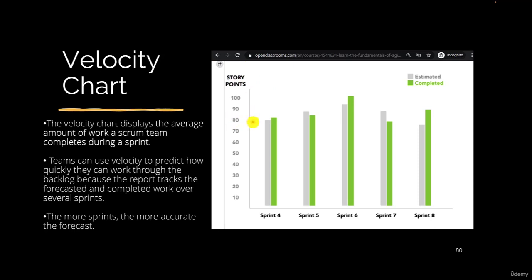Here you estimated 80 hours and you finished more than those 80 hours. This means that your team is able to work on tasks that have story points more than 80. So in the next iteration, we give a higher estimate, like 90. Based on this estimate, at the end of the iteration, we found that we finished only 85 story points.